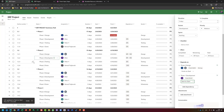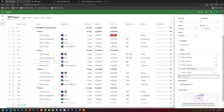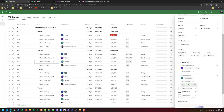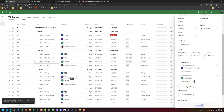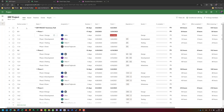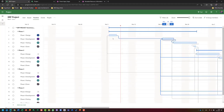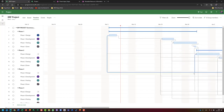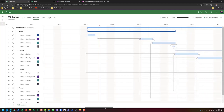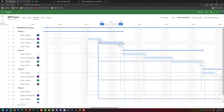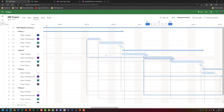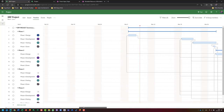For development, I can go into details and say phase one development should be start-to-start, and for phase two testing I can set it start-to-start with phase one testing. I'll do the same for phase three and phase four. Now my schedule is done. In the timeline you'll see that phase one design starts together with phase two and phase three design, and phase one development starts with phase two and three development.